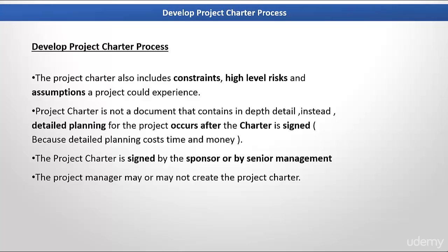It's important to know that the project charter is not a document that contains in-depth detail. Instead, detailed planning for the project occurs after the charter is signed. The reason that the charter does not contain a lot of detail is because detailed planning costs time and money. So, detailed planning only starts once the project charter gets signed by senior management.